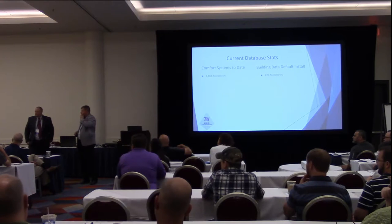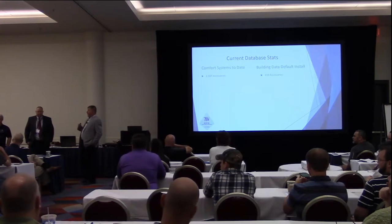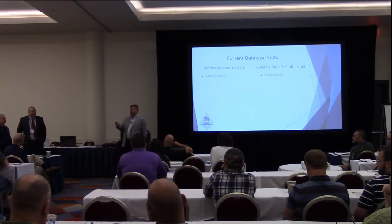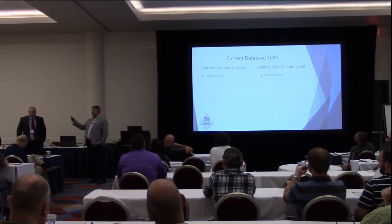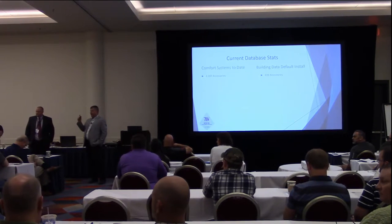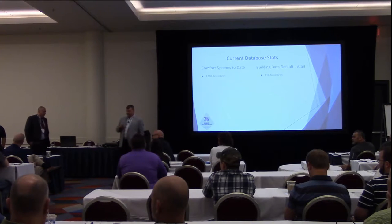We had some jobs that they've been working on for a month or 6 weeks already, and this was going to be a year and a half project. So yes, we did have some of that to go back and do and write scripts to swap out data and things like that. And we had some of them transition on floors, right? Finish out this floor. When you go to the new floor, just know you're going to use the new configuration, the new database. Okay. Counting on them to log in, though, to pick the right database. Bingo. Absolutely. It scares us since I've got a user there that is going to pick the right database. That was part of the training. That was part of the process.